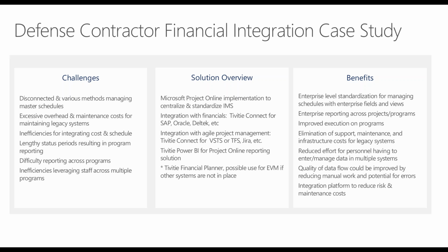Now, one other scenario that we have seen for organizations that perhaps may not have an earned value management tool set, we can leverage the financial planner to generate earned value metrics as well. So as you capture that time phase plan, that time phase actual, and your time phase progress, the financial planner can actually help you report on earned value as well as allowing you to enter that information in or integrate with other financial systems. So that's another scenario for those organizations that are maybe a little bit less reliant on the SAPs or the Deltecs or the Oracles for their earned value management.